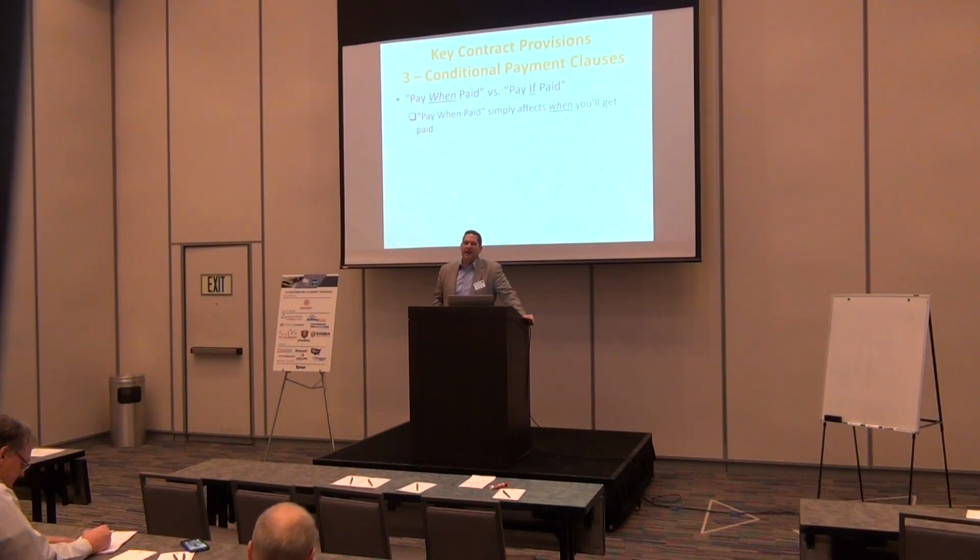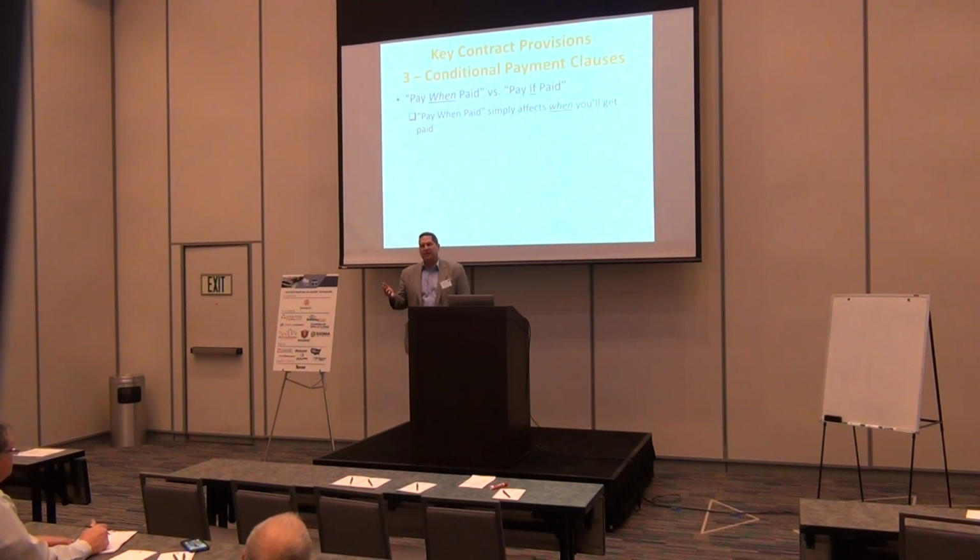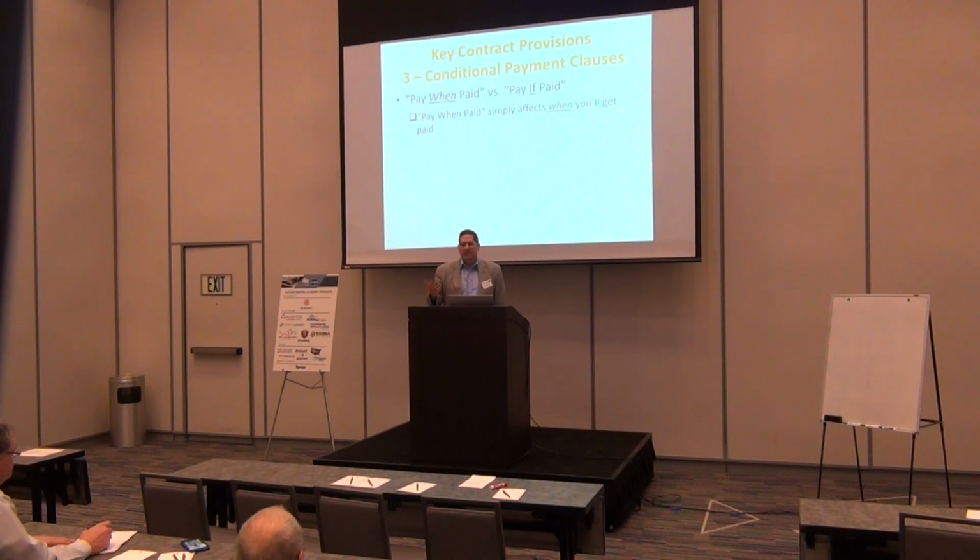If you look at the AIA, that's what it's going to say. It's going to say that a subcontractor is going to get paid within so many days after when the general contractor gets paid. Okay, so it's just the timing piece of it. So it talks about when you're going to get paid.